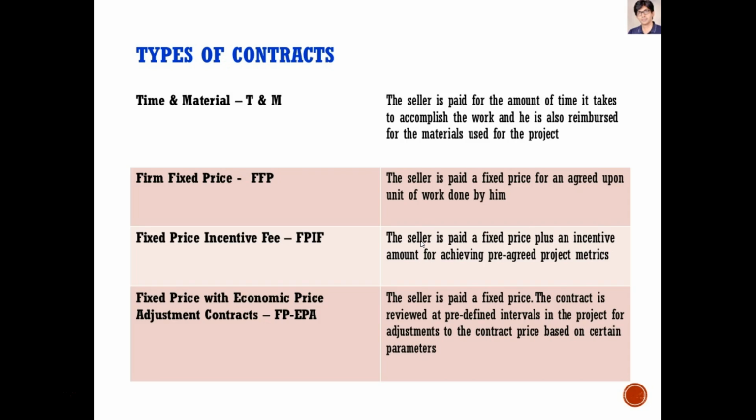A firm fixed price. So there's another term that I've seen recently or more frequently, especially on construction projects, and it's called a guaranteed maximum price. So in other words, we agree on a project. So where I have seen this is in building some hospitals and some other construction projects like that, where the contractor agrees to a maximum price of, let's say, $32 million. So the contractor then, the more that they can squeeze out of that project, the better off they are, right? So that they have a firm fixed price and they're going to deliver the hospital as the documents require.